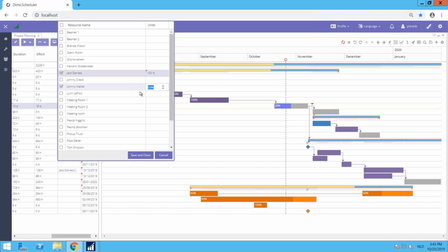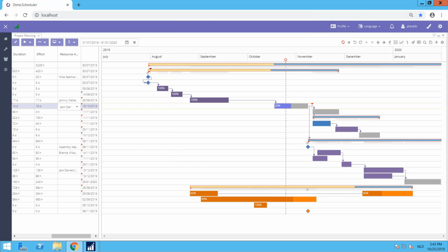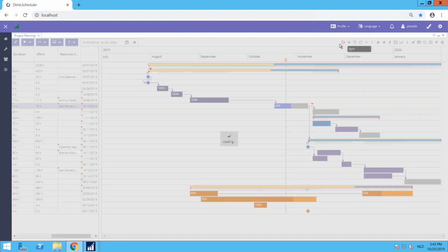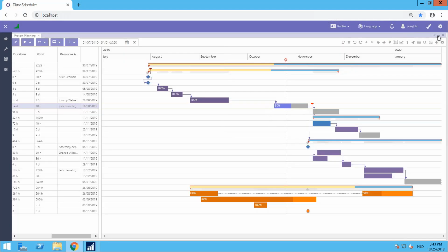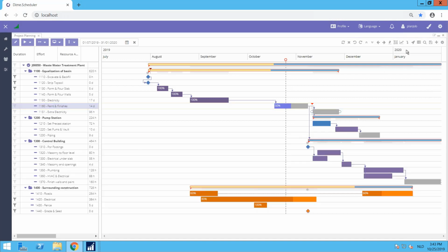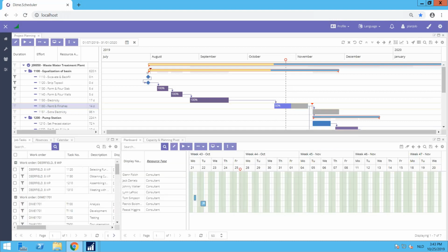Now, as I explained, this will now use the very specific calendars for Jack and for Johnny that are allocated to them, to start allocating those 14 days, which I have now mapped out and fully depleted, and place the resource allocation in their calendar. So if I click on my sync button, it will now start creating full days for one resource, half days for other resources. And if I would go and look back to my resource allocation, so if I minimize this, sorry, I will see now, okay, I have here Jack and Johnny.